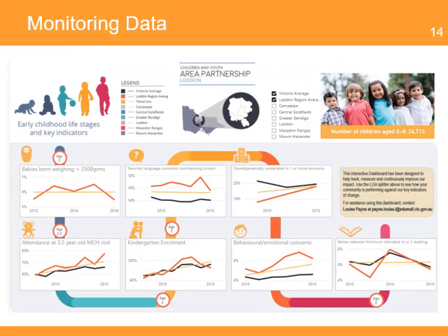Another important feature of a PMIS is the ability to manage monitoring data collected by the project. This information will include data from beneficiaries collected from surveys, interviews, and focus groups. The PMIS presents the progress on each indicator to facilitate the analysis of the project performance and identify any variances with the planned targets. Information can be presented in the form of charts and using maps to visualize the results achieved by the project or program.